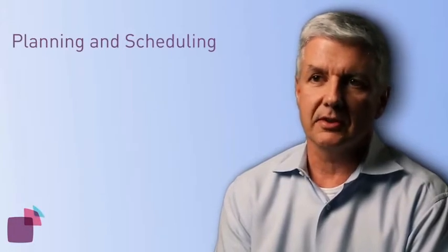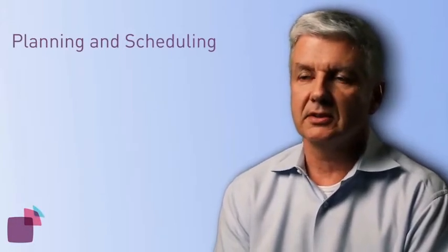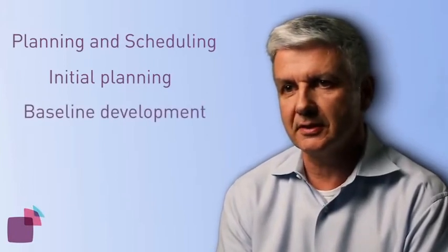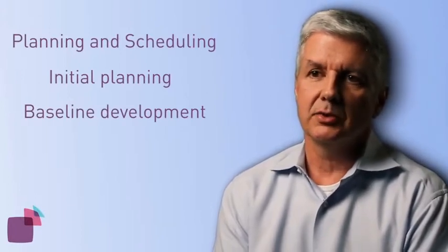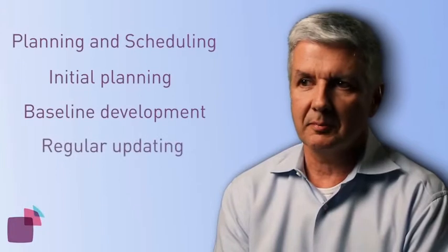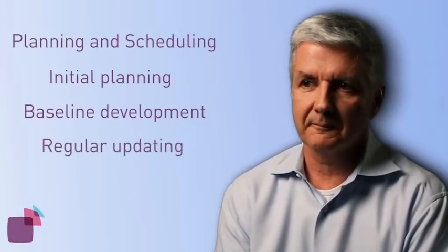Next major topic, we talk about stages of planning and scheduling. That's probably the meat of the entire presentation. We start with initial planning, the collection of information, forming the basis for the plan, moving through to baseline development, capturing that baseline as a benchmark for the project, then move into the regular periodic updating, weekly and monthly.